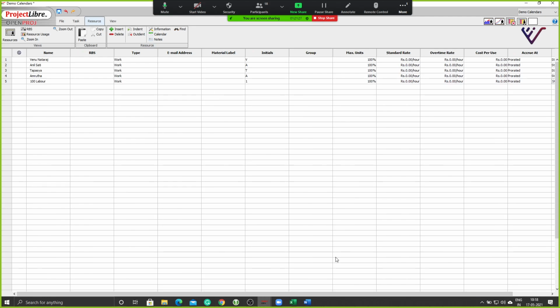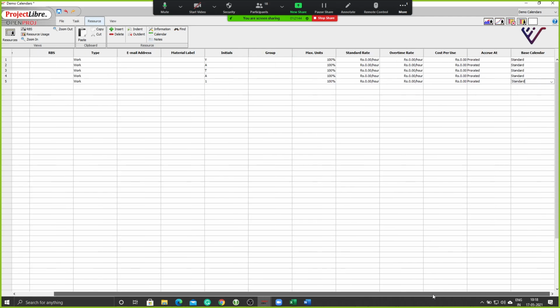Yeah, that is a safer way of doing it, because you are not making the schedule dependent on the activity, but you are making it dependent on the people working on the activity. People working on it. Got it. Yeah, so it should happen in the resources. Ideally, it should happen here. So it is showing correct right now.